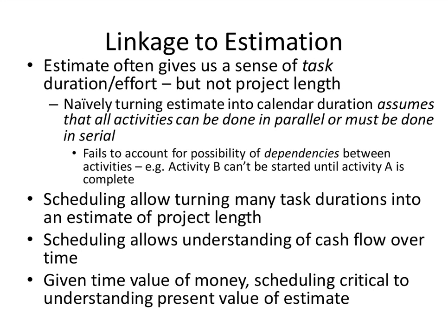There's dependencies between tasks. And we can't simply naively go from a total amount of work in terms of person days or what have you, or person hours, into an amount of time because of these linkages, these dependencies, that prevent us from undertaking, for example, 2 tasks in parallel.